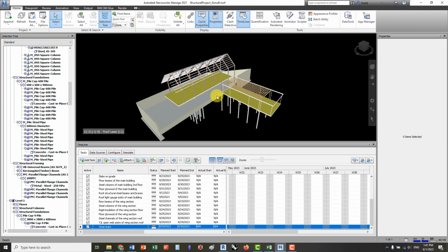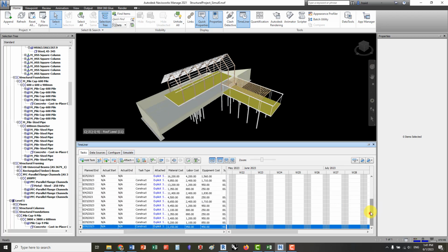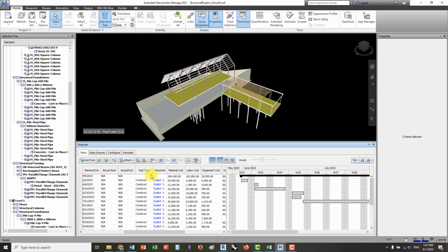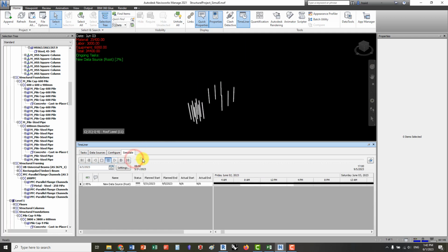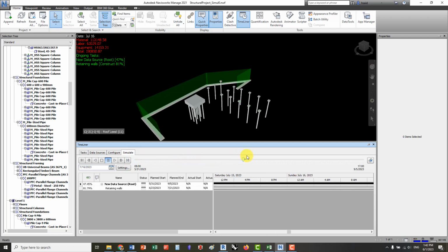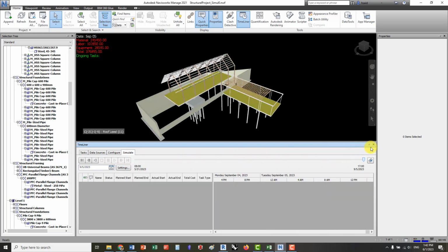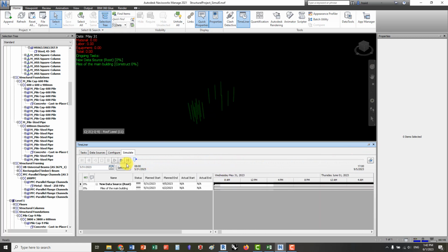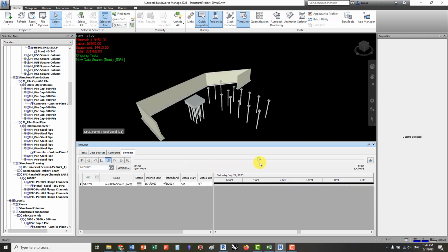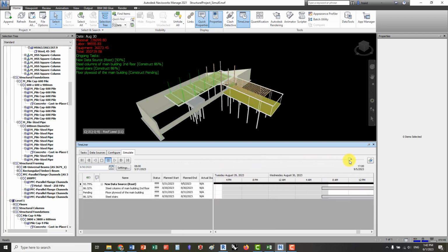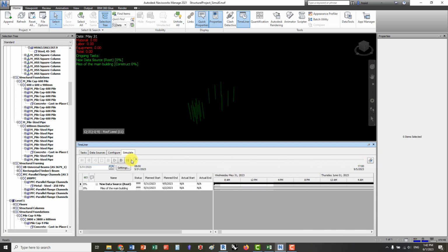So I attached all the elements to all activities, and all activities have attachments to them. Great, except for, of course, the summary task. Now, if I go to simulate and show the simulation that happens here, pretty cool. Now, all these elements, the green ones, are in progress at any point of time that I'm at. Nice.